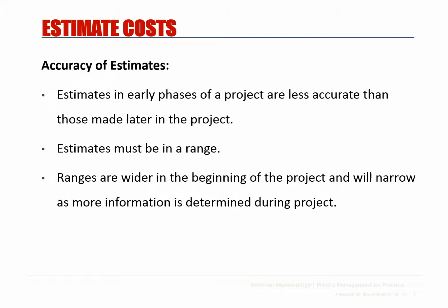Ranges are wider in the beginning of the project and will narrow as more information is determined during the project. Why you need to estimate using a range initially is due to the fact that you don't know a lot of information about the behavior, company ethics, the project context, etc.